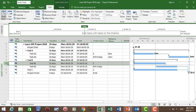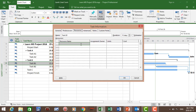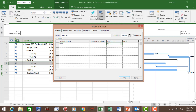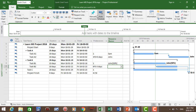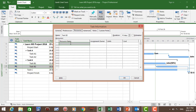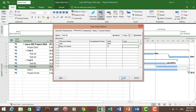For Task B1, click on the Task tab, then Information, and go to Resources. Assign John to the task and set John to 50%, so John will spend 50% of his time on that task — if a day is eight hours, he will only spend four hours on that task. For Task B2, go to Task Information, Resources, and assign Sam to the task. Also assign Bags of Cement, with 10 bags of cement.